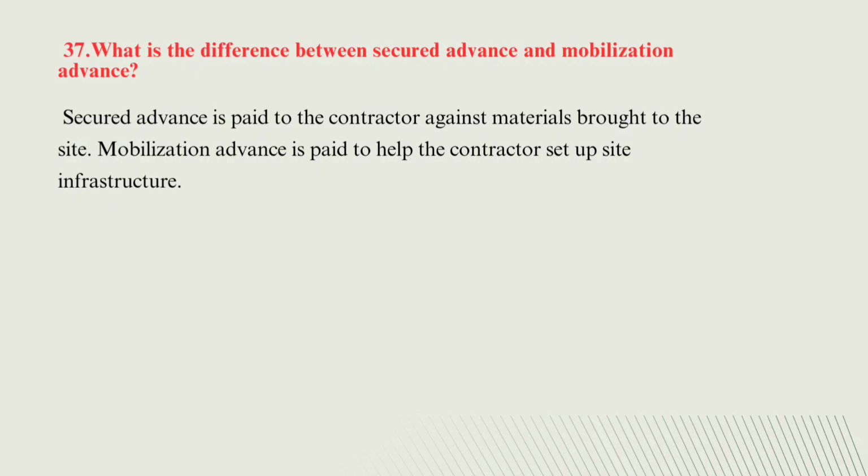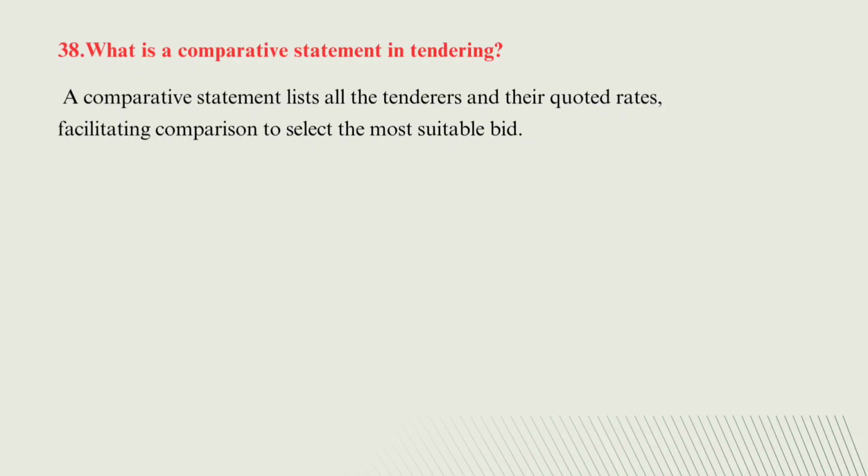The answer is, secured advance is paid to the contractor against the material brought to the site, and mobilization advance is paid to help the contractors set up site infrastructure. Next is, what is a comparative statement in tendering?